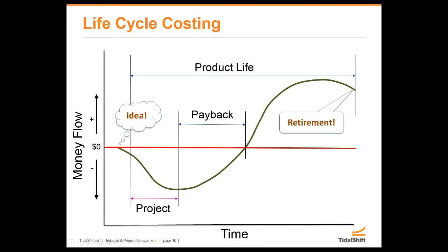We also want to make sure we temper that with what the priorities are. So if I have a regulatory type project where we have a hard stop deadline, you have to deliver by this date, then we're going to be managing our timeline very tightly and perhaps not so much the costing. Or vice versa, maybe the cost is the number one priority, or the scope is the number one priority. So we need to make sure that we have a very clear picture of that, so we don't end up trying to deliver something on time, on scope, on budget, and meanwhile what we end up delivering is not going to be useful to the client. And of course I'm using the term client both as an internal or an external client.